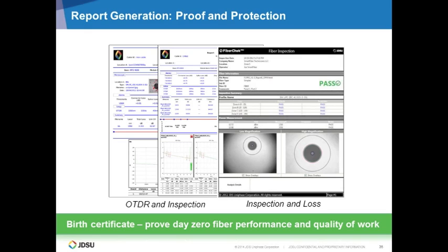So the question comes after, what do you do with those tests after they are done? Our equipment can provide the PDF report that's first a certificate of the installation that will enable you, if you're a contractor, to get paid by the provider, or if you're a service provider, to know what exactly is installed and how it looks like for your record that can be used down the line if there is any issue.